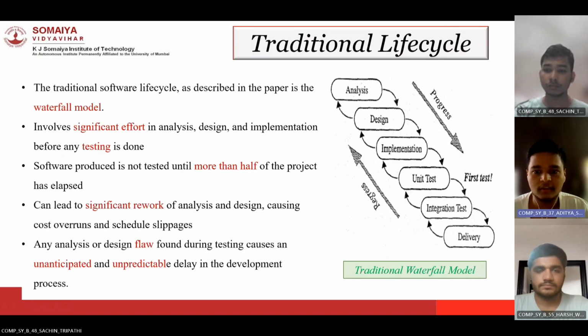So in this research paper, the author has also talked about the traditional life cycle. The traditional life cycle is the waterfall model, which the author has taken into consideration. The waterfall model involves significant effort in analysis, design, and implementation before the actual testing part is done. So the software produced is not tested until half of the project has elapsed.